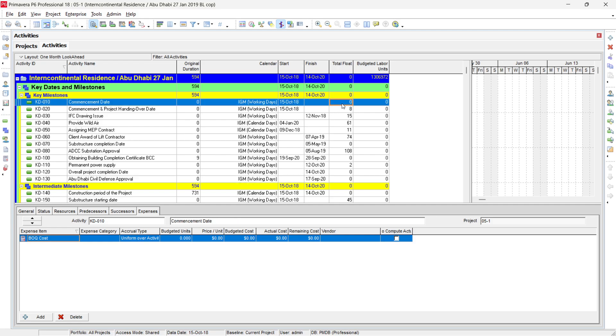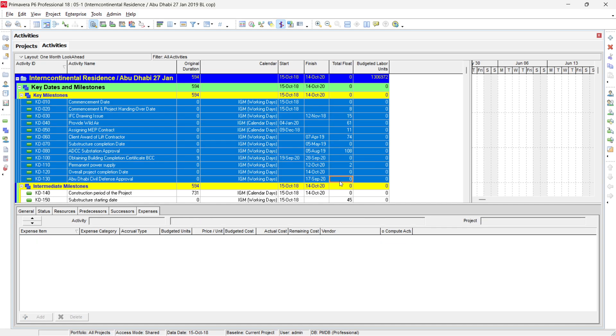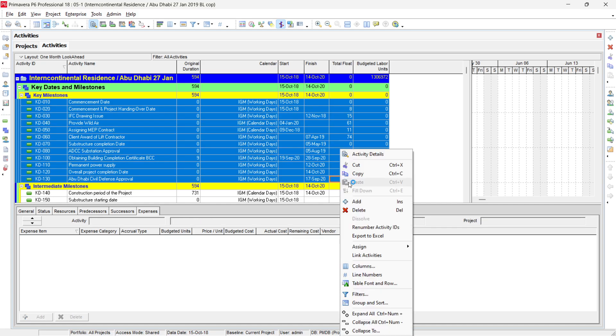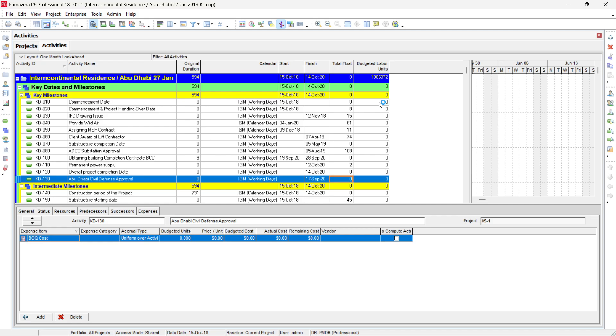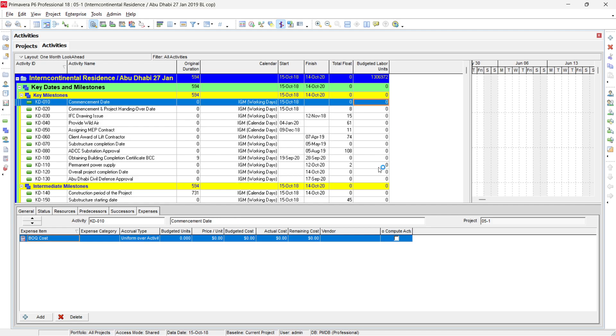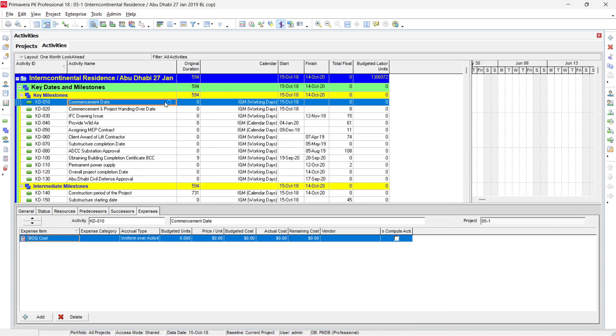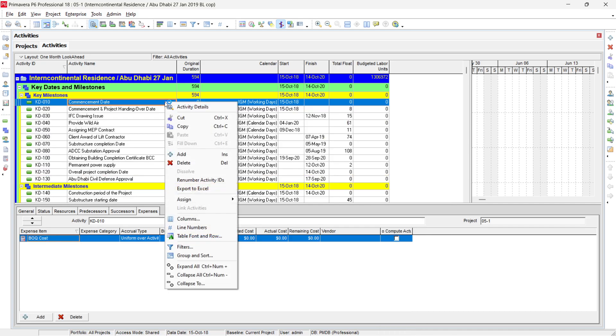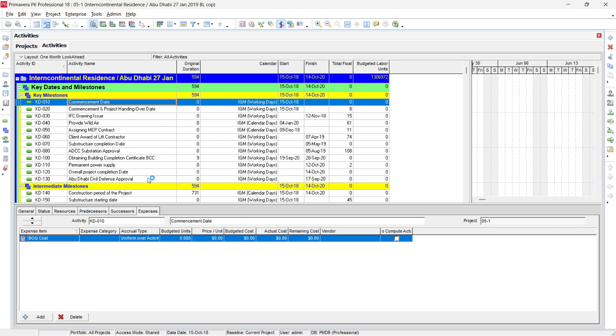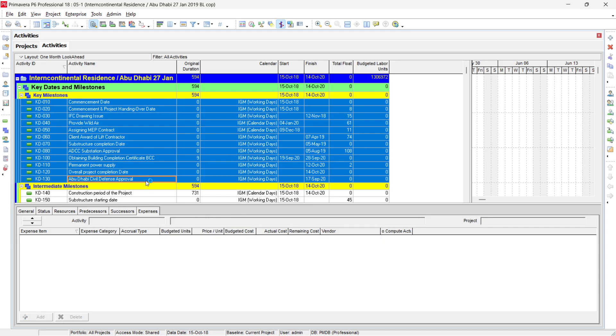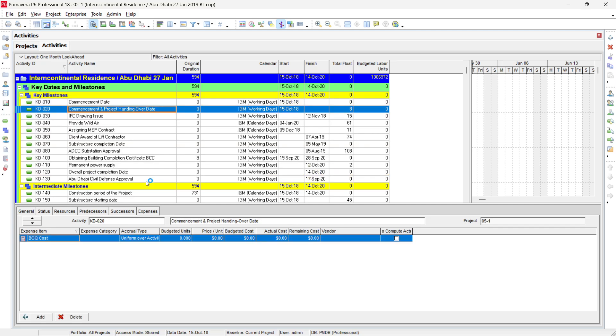Total float will not be available because total float is a calculated field which Primavera calculates. And similarly, budgeted labor unit we can define using the fill down option. So fill down option as you see can be accessed by just clicking the right click anywhere in the Activity or just press the range and then press Ctrl E. So from Ctrl E, you can see that the data is spread automatically in all the selected range. And similarly, we do Ctrl Z to undo the changes. After making these changes and we want to show the effect of these changes on our screen here, sometimes it is not shown.